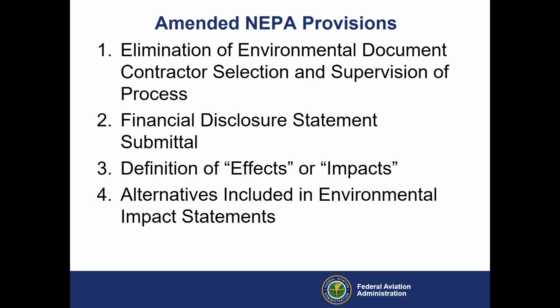Effects should generally not be considered if they are remote in time, geographically remote, or the product of a lengthy causal chain. Effects do not include those effects that an agency has no ability to prevent due to its limited statutory authority or would occur regardless of the proposed action.